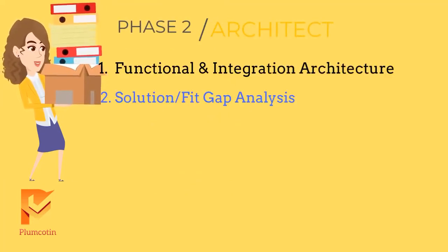Fit gap analysis. Identify fit gap exercise between future state and Workday. It serves to identify what workarounds are necessary to bridge any gaps and minimize risk. Also document key current state capabilities and business process flows versus future state business process flows.